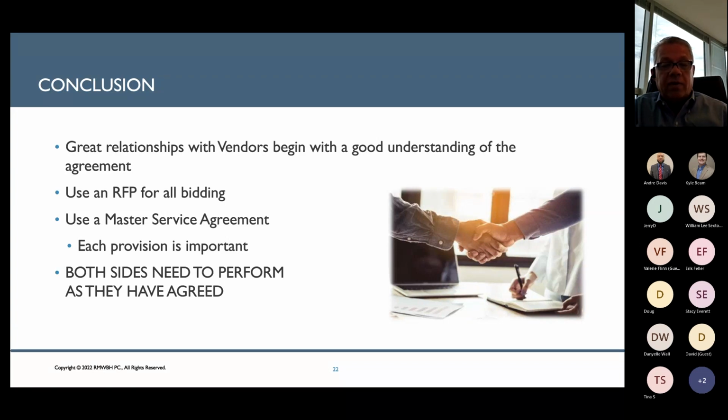And I see that a lot, is that the scope of work comes and says, we're going to charge you $15,000 to build this fence, and we're going to build a fence that's 6 feet high. Well, that's probably not enough detail. You want in there how it's going to be constructed, maybe a rendering of what it's going to look like. We've seen $1 million contracts that are a page long, and I can tell you that is not going to cover all the things that it needs to cover.